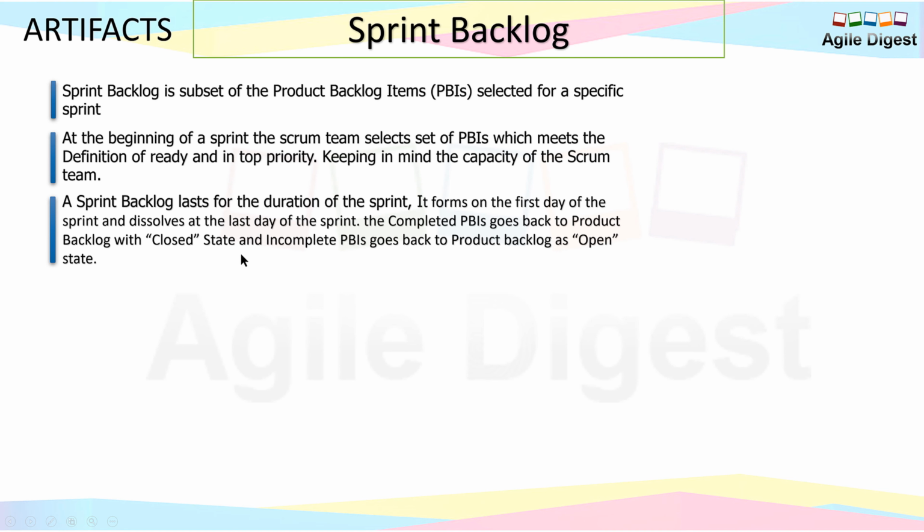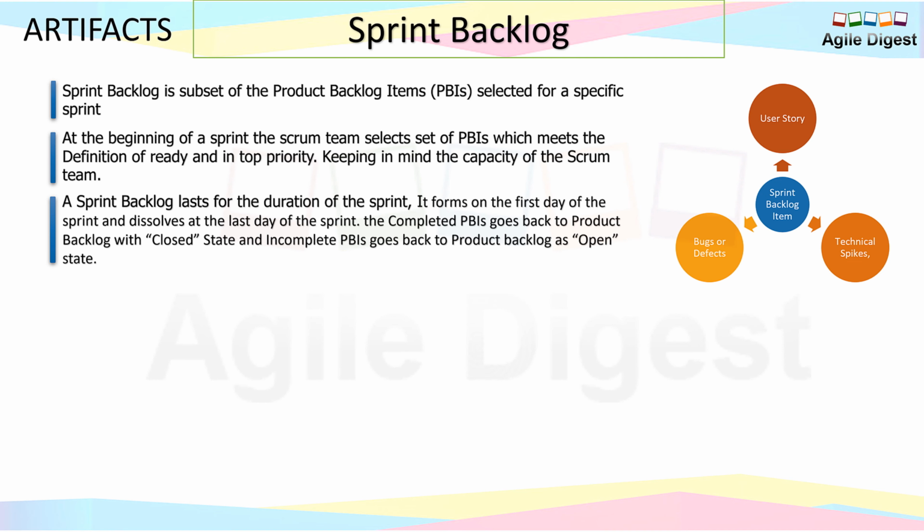But practically the sprint is an area where we mark the stories temporarily for a sprint scope. When it is completed or not completed, it all goes back to the product backlog. In Jira, the closed product backlog items are not visible in the list, but those are still part of the backlog where you can find out which are the closed items and which are the open items.